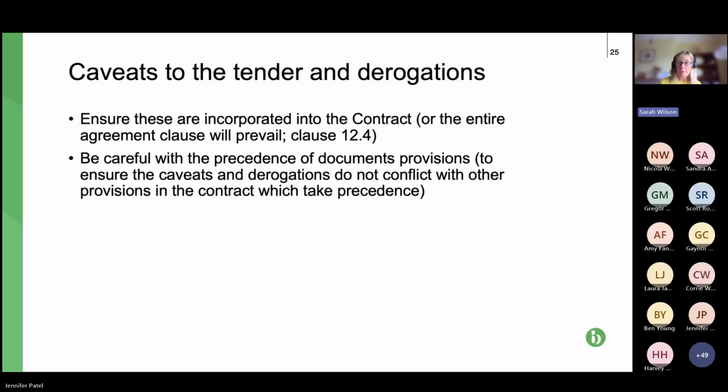The first rule is they must be sewn into the contract one way or another. If they just go into the tender, and usually the tender will not then be sewn into the contract, they have no impact on the risks and liabilities, which is really unfortunate for a contractor where it has put forward a price based on them.